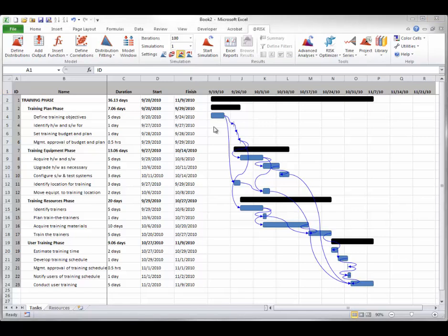You can now add probability distributions to the durations of selected tasks. For this example, I will add discrete distributions to 3 of the task durations. The distributions used can be any reasonable distributions, but for this illustration, I want them to have enough variation so that you can see some range in the simulation results.